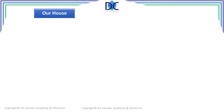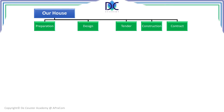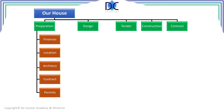Let's look at our house at level zero and decompose it. We can find the preparation, the design, the tender we have to send out, the construction itself, and the contract. We can also split these as different phases, but it depends on the size of the project. In our case, let's consider it as one project.